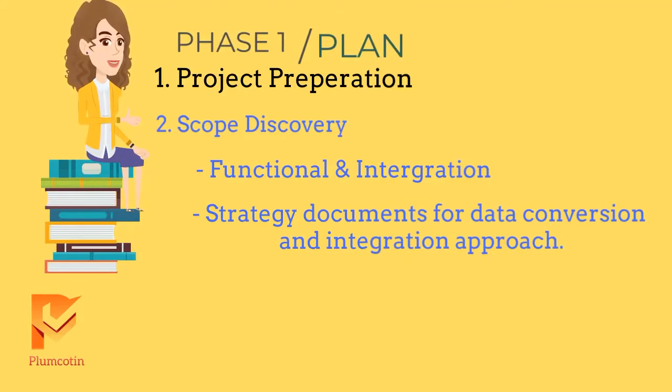Scope discovery meetings for identifying functional and integration scope in the project. Workstream managers will plan the schedule of discovery sessions that will be needed for each functional area, and for each integration under the respective workstreams. Initial strategy documents for data conversion and integration approach are also drafted.